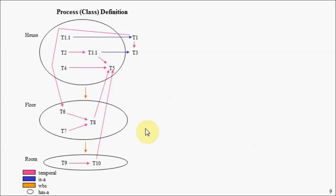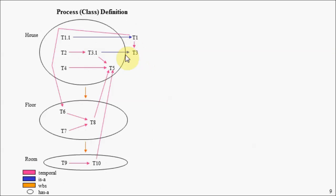Let's now look at our finished process definition. In the last slide, we were putting together a definition of a room with tasks T9 and T10 and the temporal relationship between them. Here's our floor definition, and here's our definition for the higher-level entity called a house. Notice that we have a task called T1.1, which is a specialization of a more general task called T1. Similarly, T3.1 is a specialization of T3. There are temporal relationships between these general tasks, and also temporal relationships between tasks that cross entity boundaries.